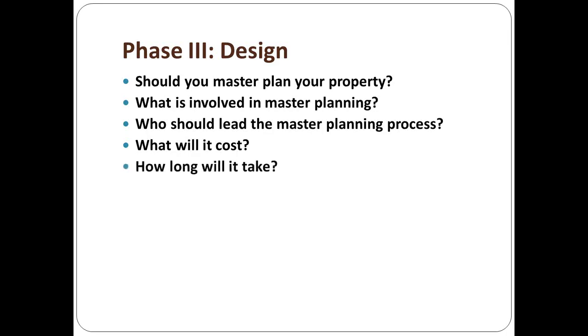How long will it take? It can take 4 weeks, it can take 4 months, and it can take a year. Depends on how quickly the church works with the architect. It's usually not the professionals who slow you down. It's the church trying to decide things they don't decide very often. Let me tell you, it's not a wheel that's well greased when it comes to preparing and planning to build church buildings. Churches don't do that often enough. Your industry professionals do it every day. So it's usually the church who is having to marinate on decisions or has some uncertainty and unease about making a decision because they don't understand what the end result of living with that decision is.